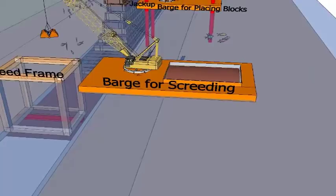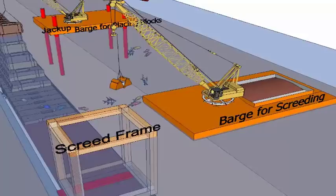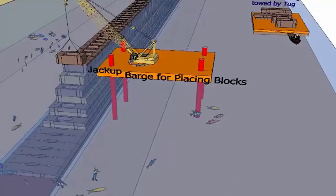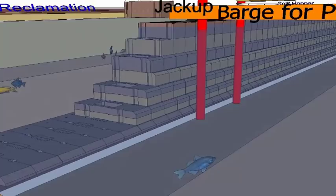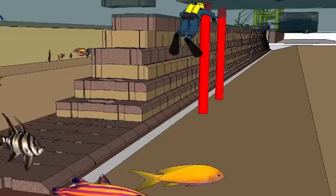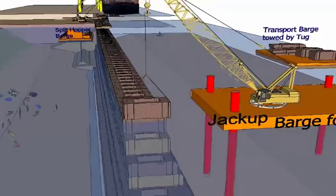Jack-up barges are hulls with vertical legs on which the hull can jack itself up. Spud barges are vessels with vertical legs, usually tubular steel pipes, that are lowered into the seabed to anchor the barge. For setting out purposes, high towers that sat on the seabed and extended above the water level were used.